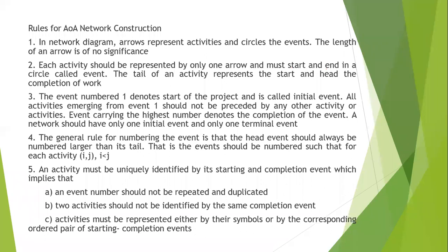The event numbered one denotes the start of the project and is called the initial event. All activities emerging from event one should not be preceded by any other activity. So one is the starting event; nothing like 0, -1, -2 comes before it. Okay, so that's the starting thing.